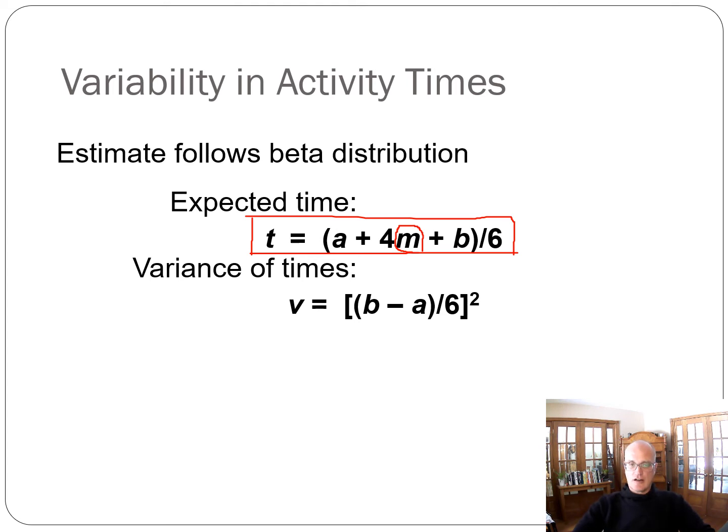The variance of a task time, the variance is equal to B minus A, pessimistic time which is bigger, minus the optimistic time, divided by 6, and then squared. And so that gives you the measure of the variance.